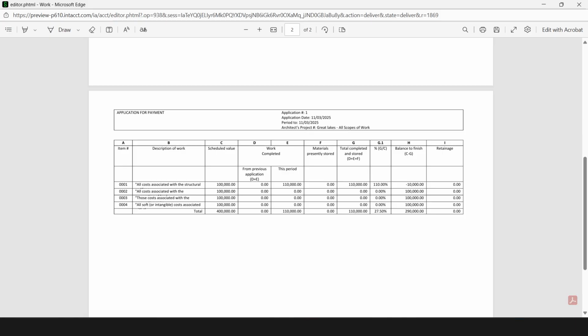So this matters for construction companies and project-based firms that are using progress billing. There might be a situation in your contract where it doesn't stipulate a fixed maximum price. So with this new option, you no longer need to manually revise the contract line by using change management to remove that cap. So it's going to give you more flexibility, and you can bill based on your progress achieved without worrying about hitting a hard cap. So this can streamline your process and reduce administrative friction. And this is if your scope is open or evolving currently throughout the project.